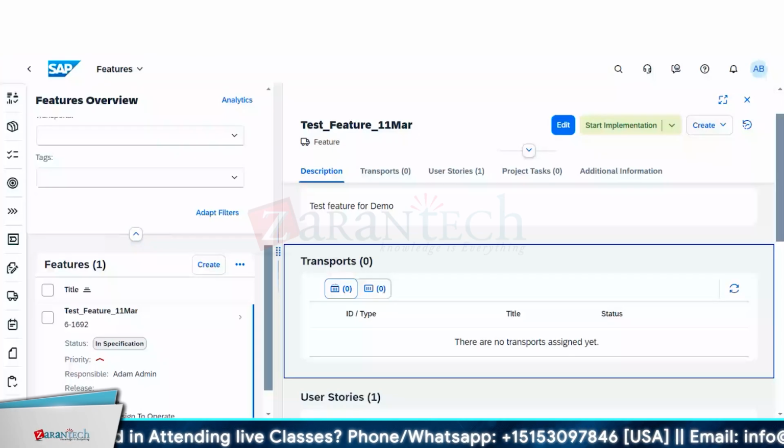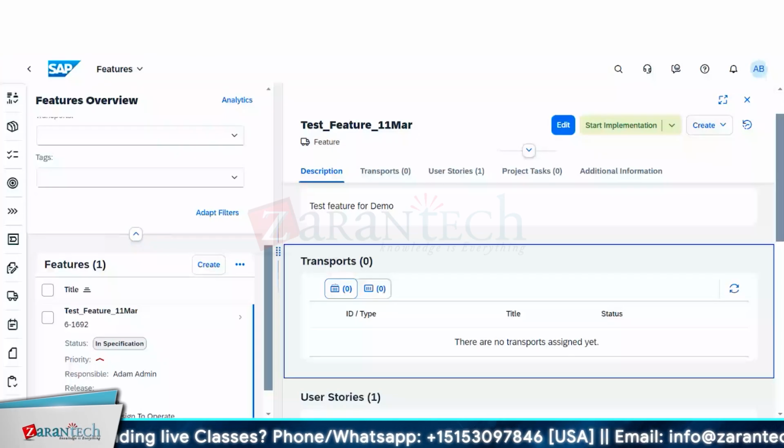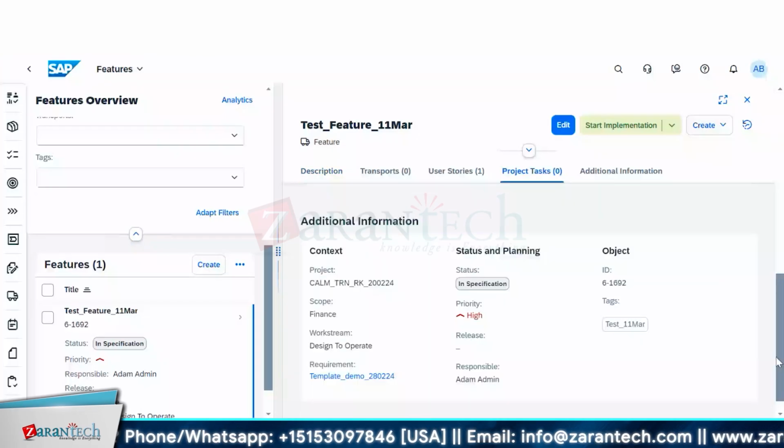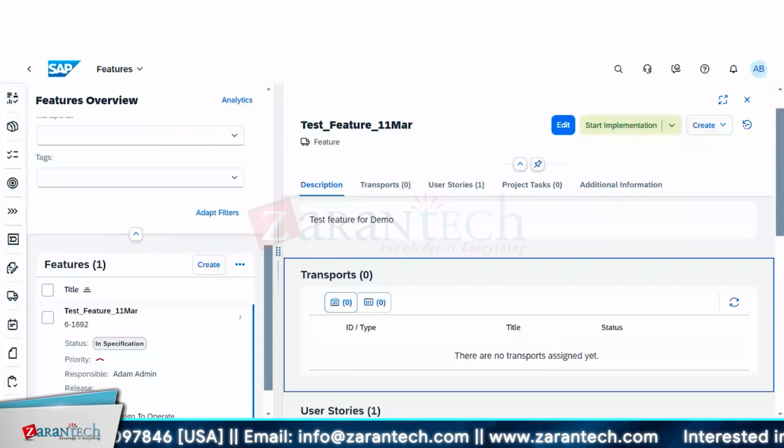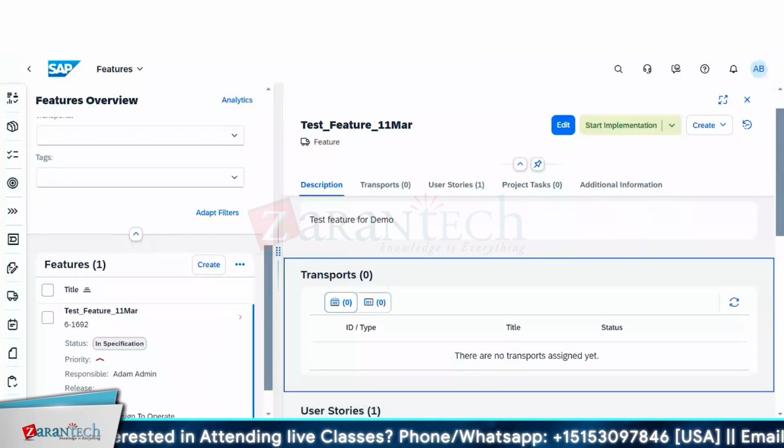No, I was saying that there is no hard stop. Whenever we create anything, nothing is compulsory, that you have to put this or that. Similarly, you can use any of these things at any point of time, but there has to be a sequence to it. You will not create a project task before you create a requirement. Even if it's running in parallel, you will have a requirement first, and only then will you know what task you need to do in the project. I'm just taking an example. Just correct me if I'm incorrect.